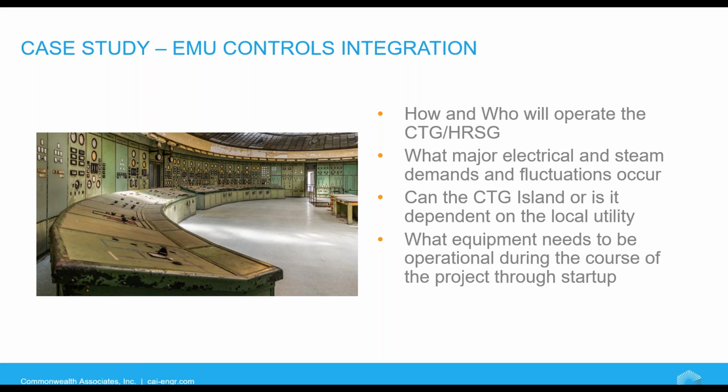These control upgrades and modifications also need to be done to support the plant's goal of operating throughout the construction. Wholesale changes should not be done all at once, or you run the risk of changes failing and your plant being crippled. There's nothing worse than having all the equipment there that you can't run because the ones and zeros aren't lined up correctly.